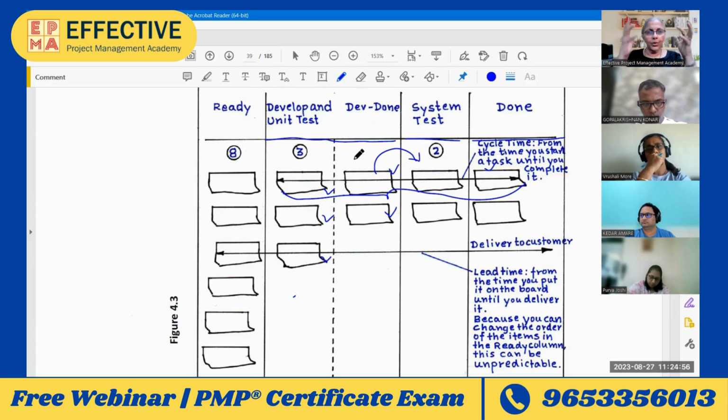On the working board, the doing board, minimize the number of stories. Early on, when your team is new and you are also new to that particular product, it's best to take only one story up. Finish that. Any problems you face, you will immediately realize what the bottlenecks are. It's only one story, so it's simple, and you will be able to attack that bottleneck immediately.